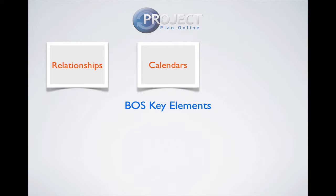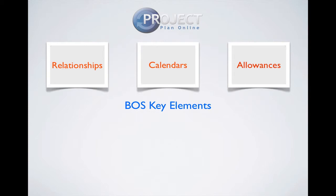What are the calendars used? Regularly you're going to have disciplines and trades working different calendars for different periods — who's working 5 days a week, who's working 7 days a week. All those things need to be communicated so that people are aware. What allowances have you used? If you've allowed 5% extra in your labor allowances to account for holidays, sick leave, and all those types of things — anything not immediately visible in the schedule you need to outline.